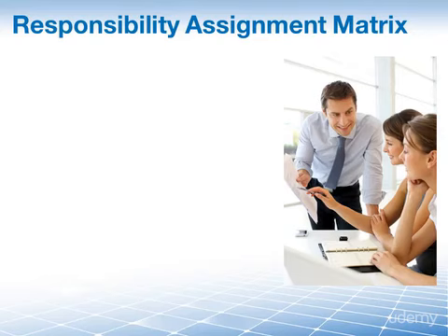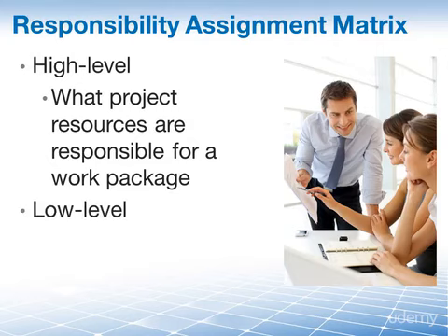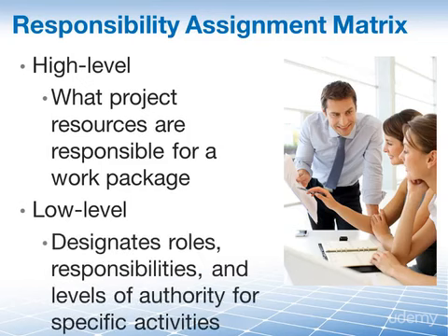And what does the Responsibility Assignment Matrix provide to our project? Well, at a high level, a RAM can define what a project team group or unit is responsible for within each component of the work breakdown structure, while a lower level RAM is often used within the group to designate roles and responsibility and levels of authority, either on specific WBS work packages or on specific activities.